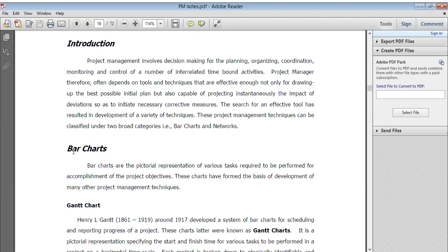So why did you not audit at the time of the budget? Because you do not have the idea. You have it, but the tolerance is different, it can increase or decrease, right? If it decreases, then your project cost, whatever you decided, becomes less, and if it increases, you added the tolerance rate. This has to be added in the budget, even in the bank guarantee or the letter of credit you submit to your bank or your supplier, right? At that time the rate of tolerance is mentioned, and it is a technical part because no one knows the market idea. So it means +5 and -5 is the tolerance you added.